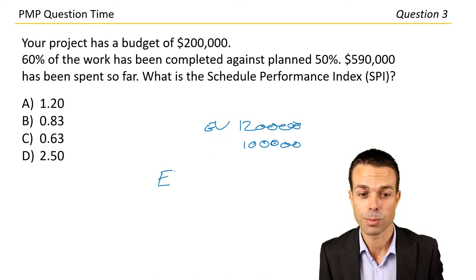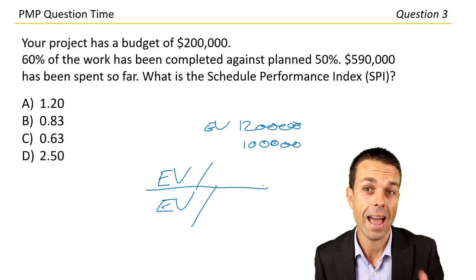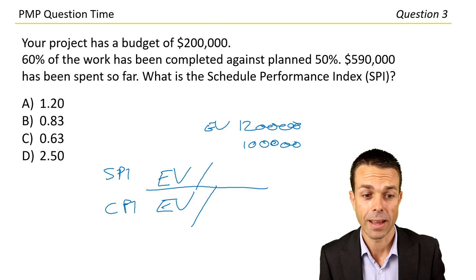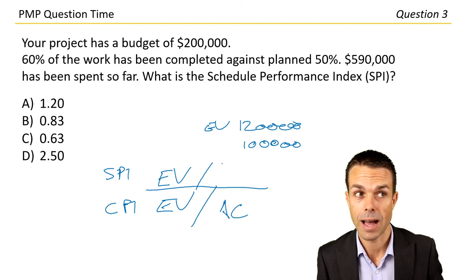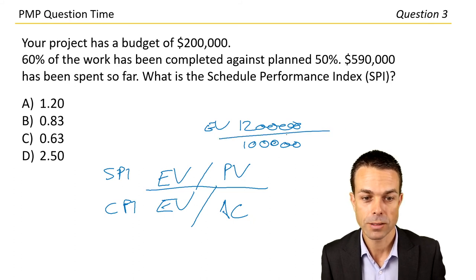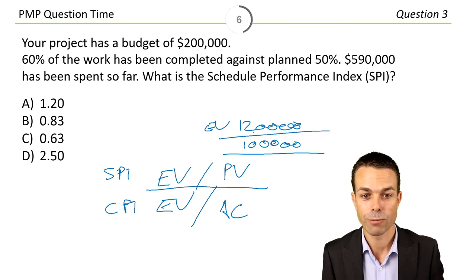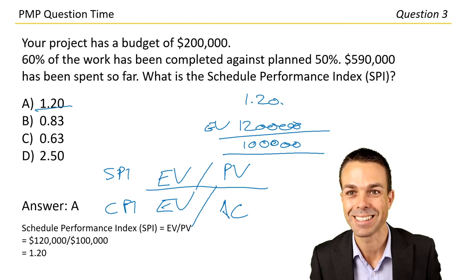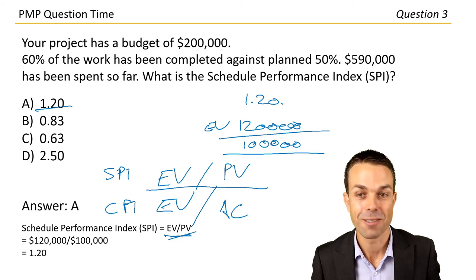Schedule performance index — these ones I can do. Schedule and cost performance index are earned value divided by something. The cost performance index is EV divided by actual cost, and the schedule performance index is EV divided by planned value. So earned value $120,000 divided by planned value $100,000 — that's going to be 1.20. Let's go with letter A. Schedule performance index: EV divided by planned value. Fantastic — answer A!